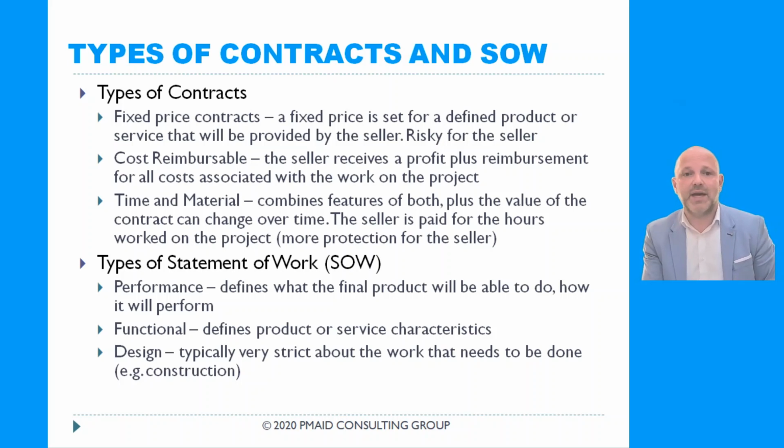And finally, time and material. It combines features of both, plus the value of the contract can change over time. The seller is paid for the hours worked on the project. It is more protection for the seller. So unlike what I explained to you for the first contract, in case of time and material, I have 10 people working on my project.